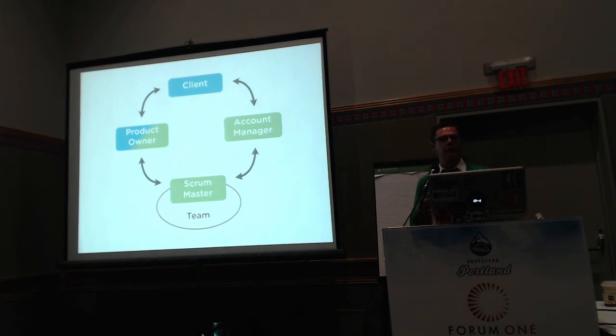But the needs of a project have relatively predictable flows. A lot of the design stuff and content strategy tends to happen up front, and then development, and then deployment and server stuff. So there's a life cycle that follows the design and development process that can be laid over a team. You start with your design and content strategy and IA and look and feel, and you establish some of that.